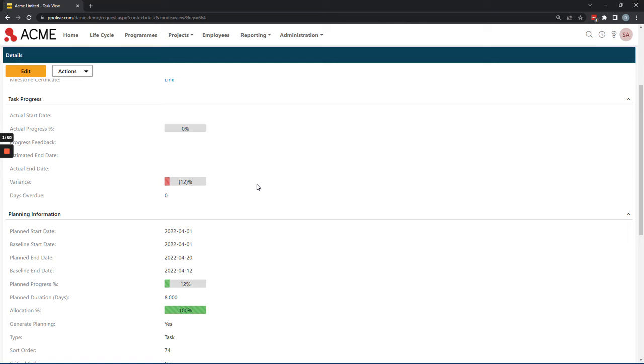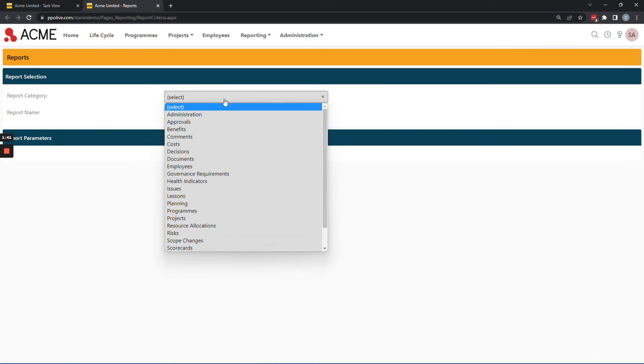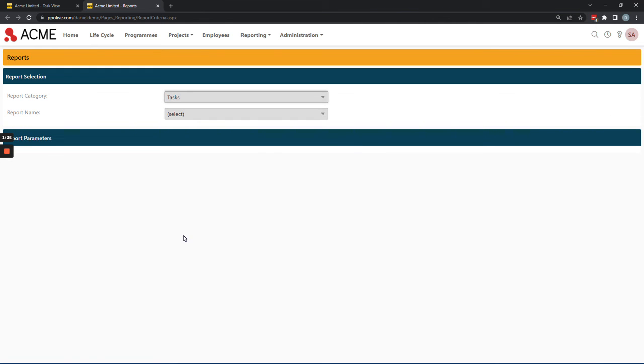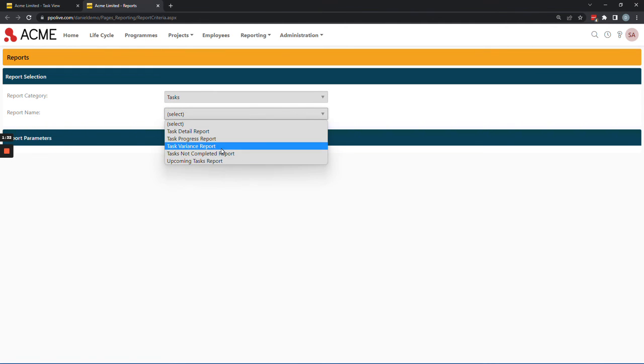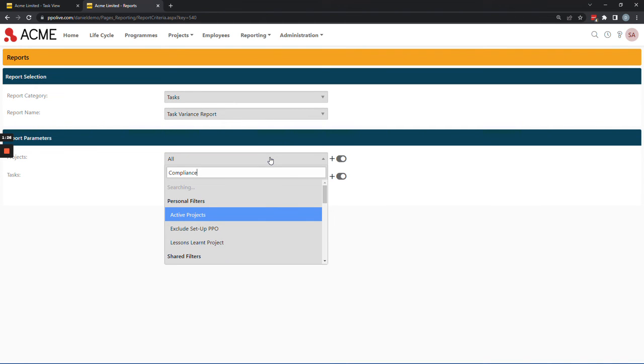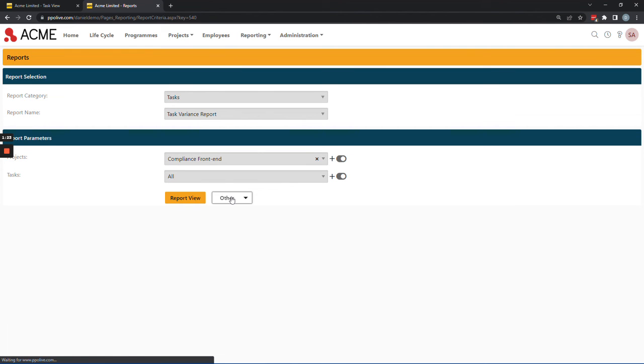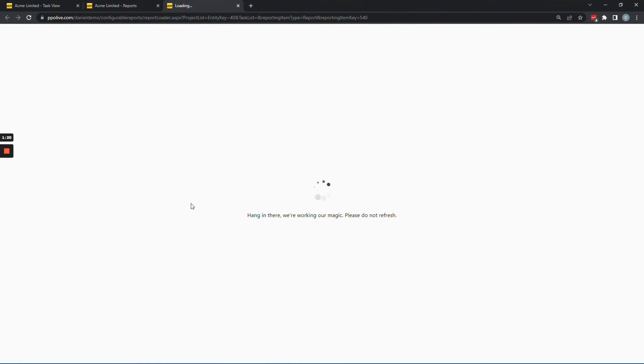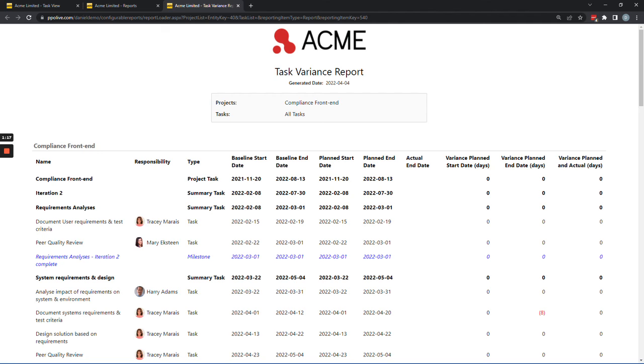Now this starts to track the slippage of the particular task. We are only focusing on one at the moment, but that particular task has now slipped. It's up to Ravi to handle the implication of that slip. So Ravi as the project manager now needs to, through perhaps a tool like MSP or through an Excel import, or even manually if Ravi so desired, understand the impact that that single task being moved on by 8 days has on the remainder of his schedule and the completion date of the project.